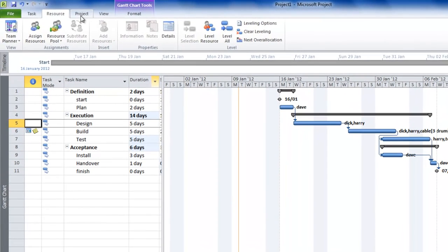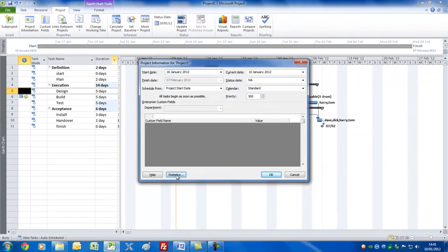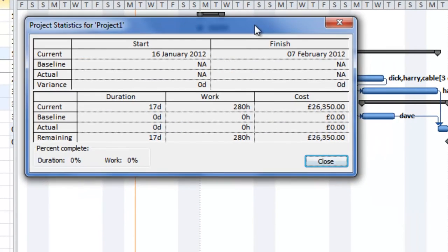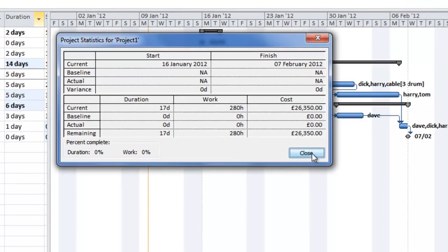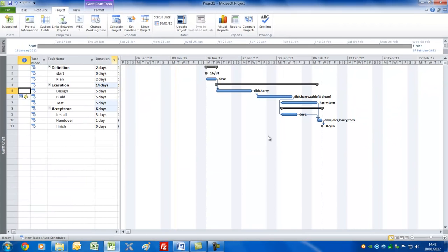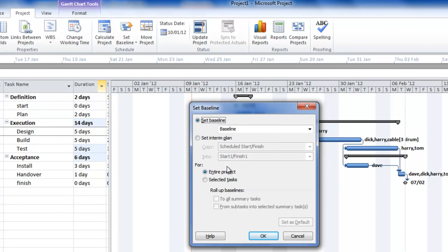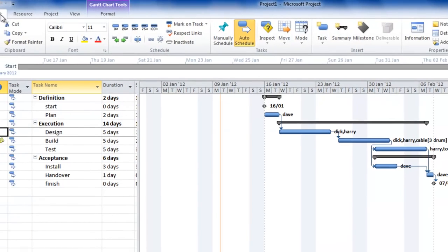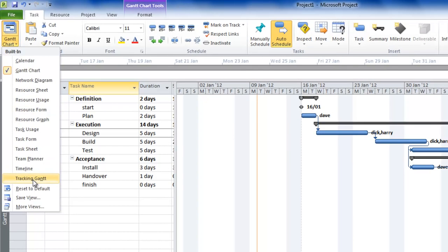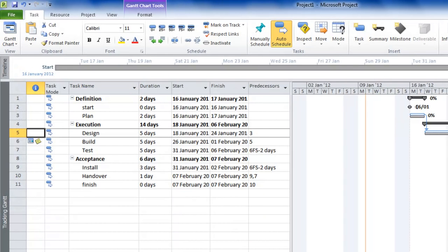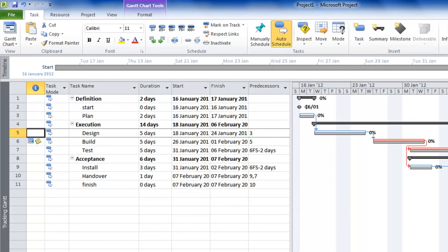Let's have a look at the big picture by clicking Project, Project Information, and the Statistics field. We can now see something of more value — we could show this to the Project Board, the Sponsor, or Senior Management to check they're okay with these dates, here's the work, here's the cost. If they're happy with that, we can get this approved and start working against this plan. We can set the baseline here — I suggest for now you set the entire project and click OK. Going back to the Task tab, select the Tracking Gantt. This is similar to the normal Gantt except it has two bars for each task — the lower grey bar is the baseline, meaning what we originally agreed.